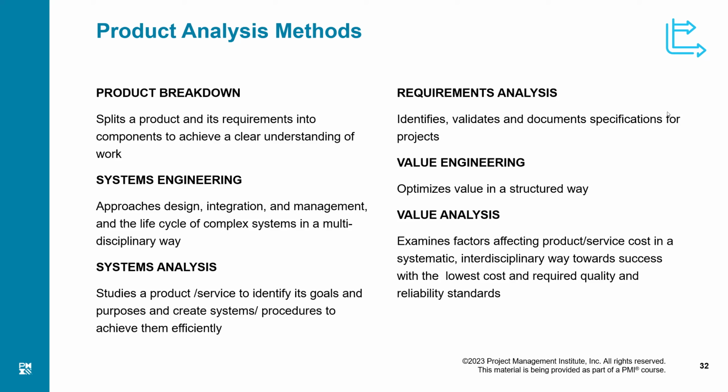But anyway, if it is broken down according to the overall product of the project into smaller products, and those products are further divided into smaller portions, that is called a product breakdown structure. Now, I am not stopping you from using this approach in your work breakdown structure. You can use the product breakdown approach or the work breakdown approach, whichever approach you want to.